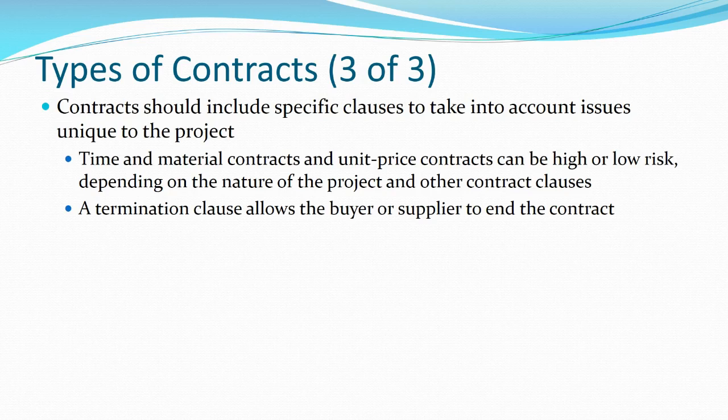The company kept on rewarding me, and reward in quotes, with additional months of free service. But ultimately, what was that worth when the service itself was no good? So the lesson I learned there was to be as specific as possible with contract language. Thankfully, we did have a service level requirement in terms of the level of service we were to be provided. And when it was time to play hardball, we were able to terminate the contract.